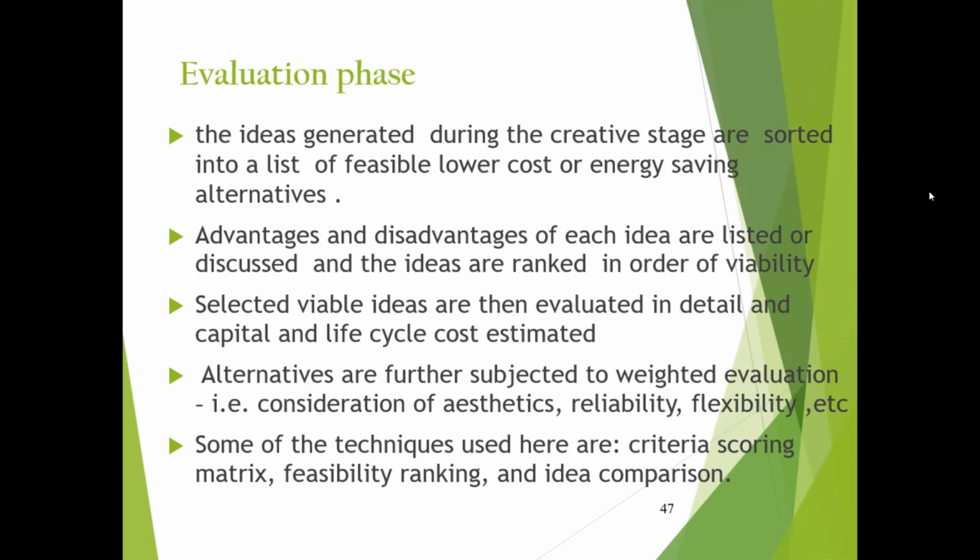Alternatives are further subjected to weighted evaluation, that is, consideration of aesthetics, reliability, flexibility, etc. What are the techniques we use? Criteria scoring, feasibility ranking, idea comparison.